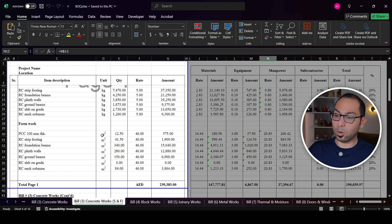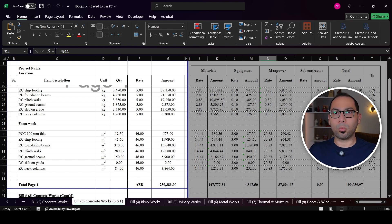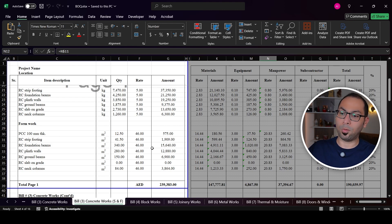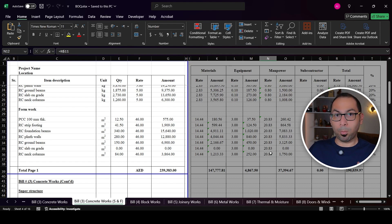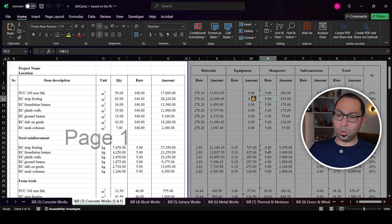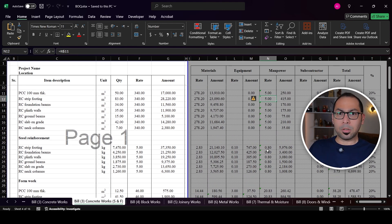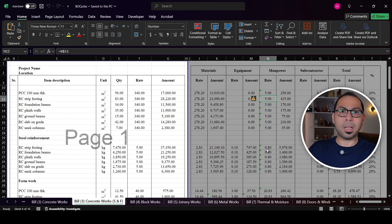For formwork, it is the same: formwork is measured in square meters, and when supplying wood or renting scaffolding, those are also priced per square meter. So for materials and plant, you have the rate in square meters already, and for the shuttering work with carpenters and scaffolders it is also in square meters. When the BOQ is measured in accordance with POMI, it is easier to estimate — though many people find this BOQ a little unfamiliar.